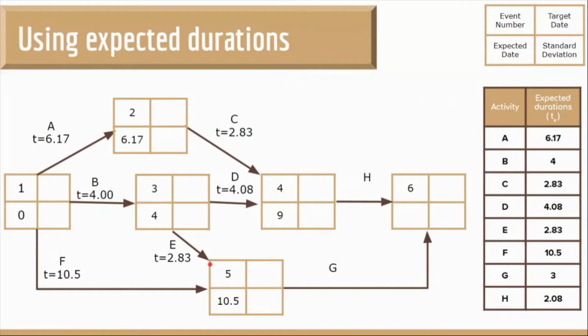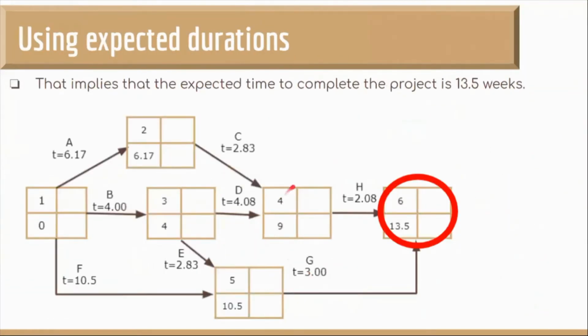A similar pattern is followed for event number 5 and event number 6. We use all the expected durations and conclude that the entire project is expected to complete within 13.5 weeks.